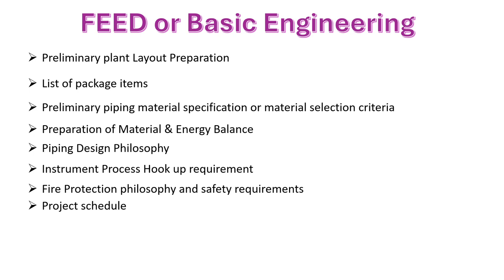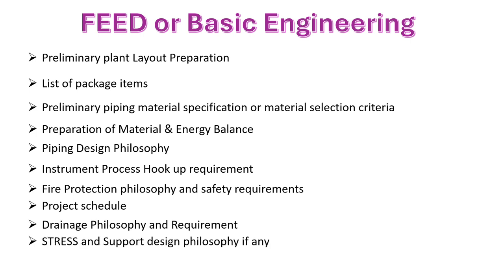Also, the project schedule covers the tentative delivery times of the equipment and the basic engineering packages preparation time. Then the drainage philosophy is to be discussed during the basic engineering phase. Then stress or support design is to be finalized during this, whether there is a requirement for stress critical lines.